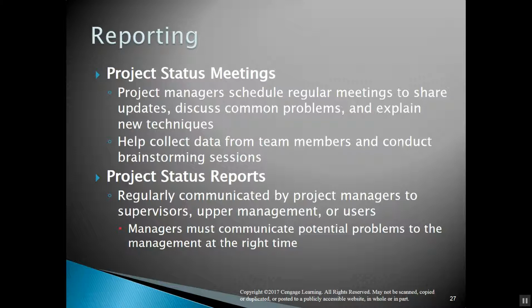And sometimes it may take quite a while to get something rescheduled, if that task is on the critical path. It's not just a matter of the critical path got extended by a day. That critical path got extended by however long it takes to reschedule that task.